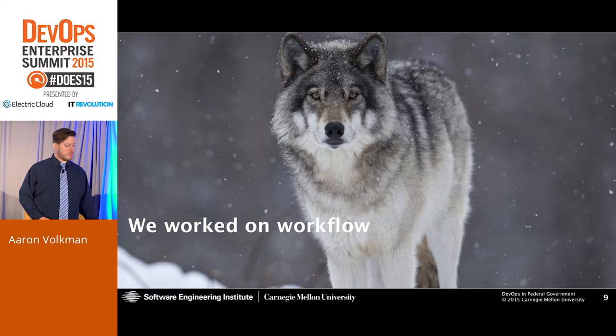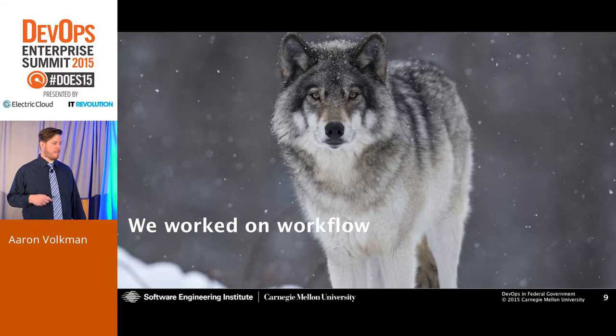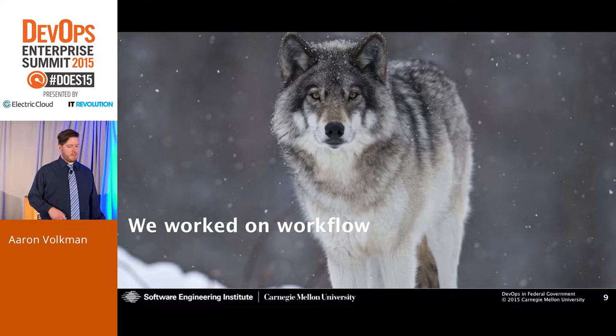So first we looked at our workflow in delivering software to them. Our customer is really used to dealing with monolithic huge releases, maybe once a year, twice a year, maybe quarterly. We were semi-agile, so we were able to release on a sprint basis every 2 to 3 weeks. We got them used to accepting these releases more often and testing them in their environment. We got to the point where there was enough trust where we could VPN in and do continuous delivery into a production-like staging environment on their side where the customer could look at it and deal with it.